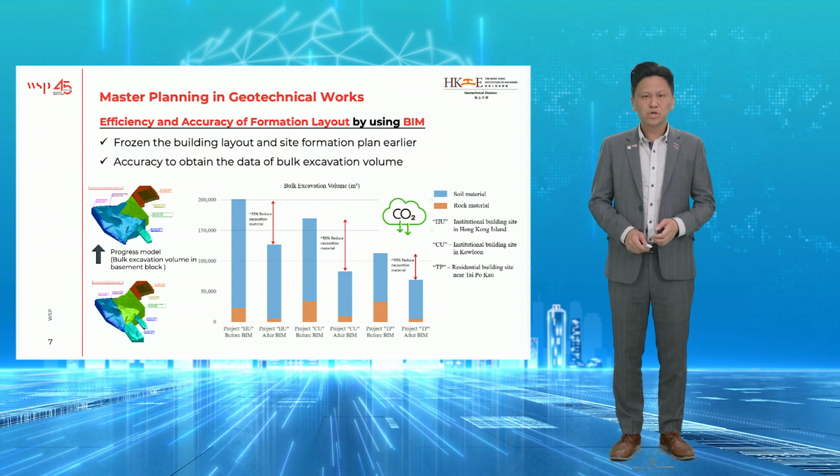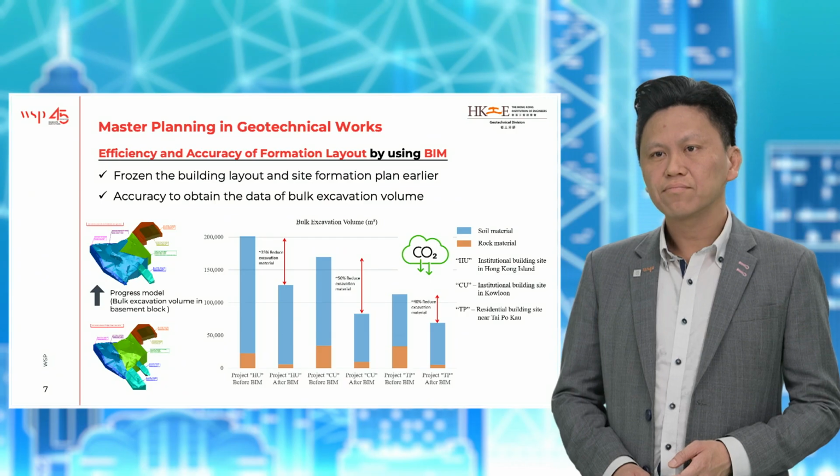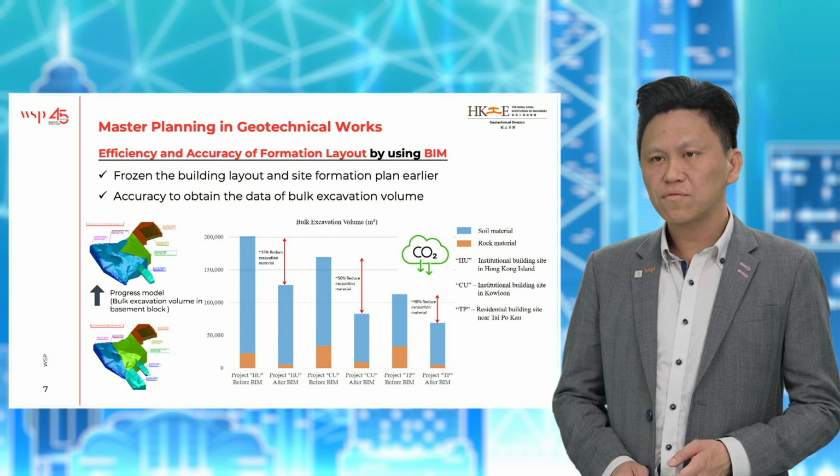Based on some ongoing projects using BIM in master planning, here is the comparison of bulk excavation volume after several reviews of building and site formation layout. This can also reveal the rock excavation zone specifically, in order to shorten the construction program as well as reduce carbon emission.